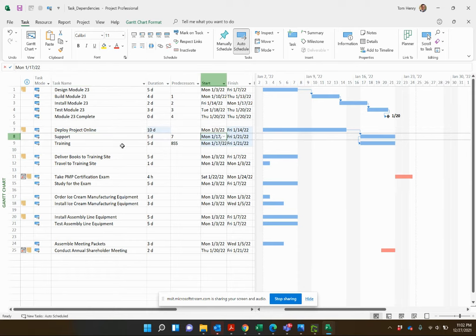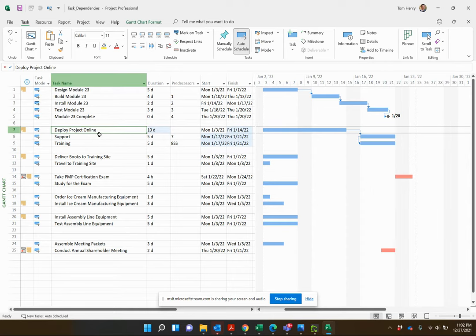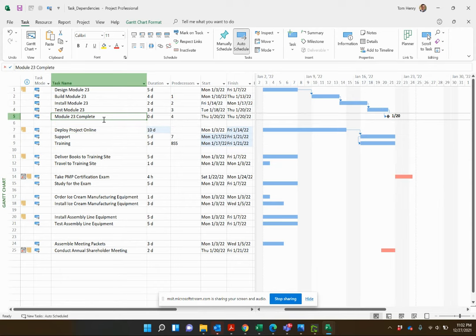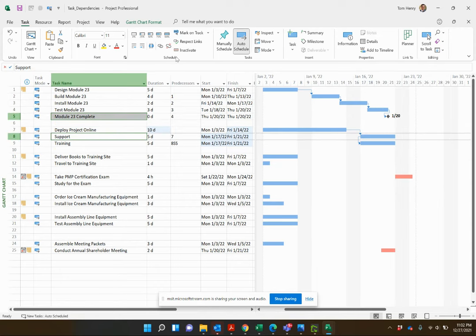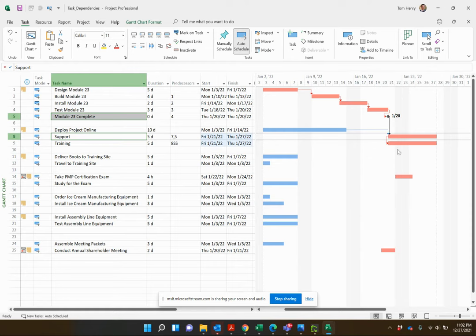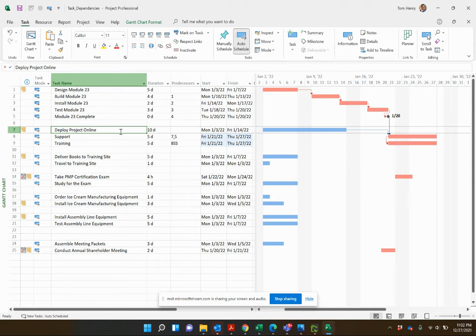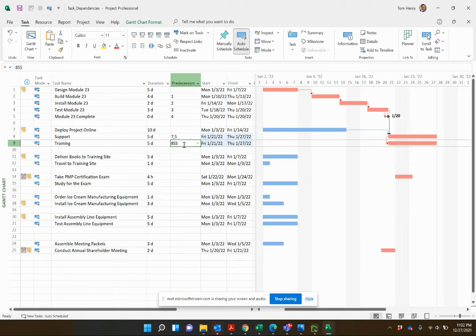The benefit of start-to-start is that if support gets an external predecessor — for example, if support staff are also working on module 23 complete and I link that to support — you can see training pushes out too. Rather than being dependent upon Deploy Project Online directly, training is dependent upon the start date of support. So it pushes out as well. That's how we model it when two start dates need to be tied together.